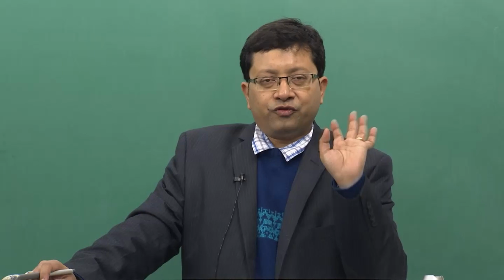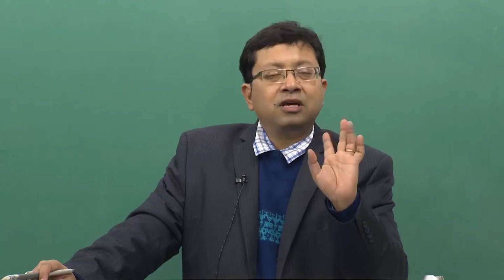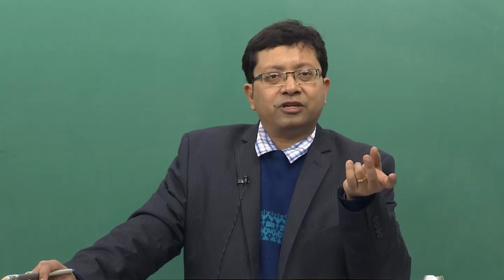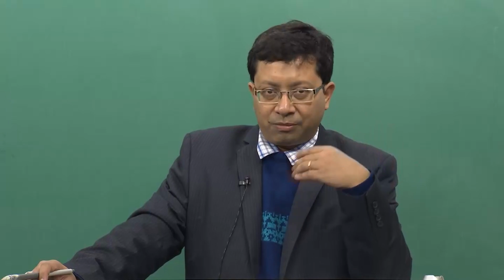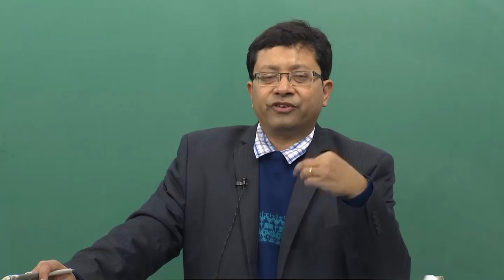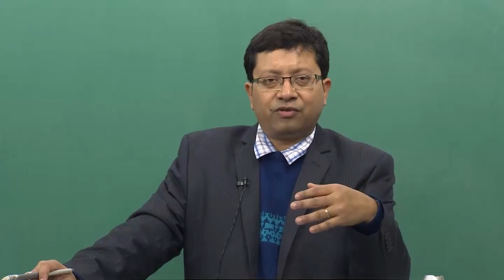circuit. So, if it is a parallel circuit, obviously you will have the concept of the probabilities and the time. Use these probabilities and the time with respect to the W function. For the series one, what did we do? We basically multiplied the W function. For the parallel one, we added up the W function, differentiated with respect to S, that is the dummy variable, put it to 0 and then found out the values.